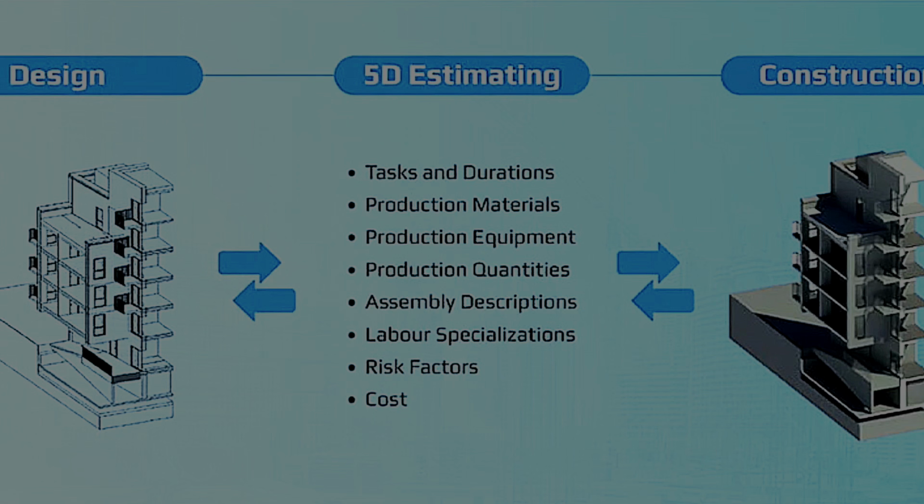So on this particular date, what should be the budget allotted for procuring concrete? For a particular date I can allocate that by this date I should have this much budget for procurement of concrete, and this much budget for procurement of steel. I can pre-plan it if I'm having a 5D BIM model with me, and also I can visually show that.